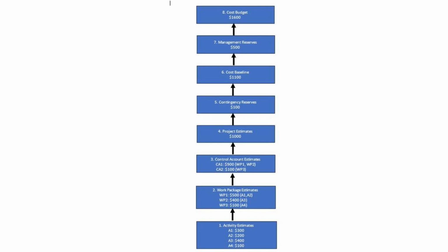A project manager will have control over the contingency reserve, but he will not have control over the management reserve, which is something that you need to contact the senior leadership team. Hope this point is very clear.